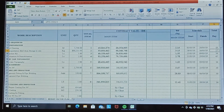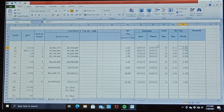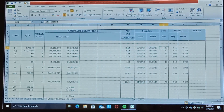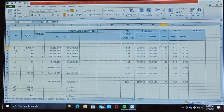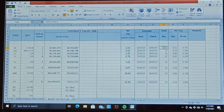We determine the schedule start and finish for each direct work item, so we know the total days scheduled for that work. Furthermore, we divide the total days for each direct work item by the weight factor from the contract price, so that we get a new combined weight factor that incorporates both the work schedule and the contract price. This combination weight factor is then allocated to the work schedule according to the start and finish of each direct work.